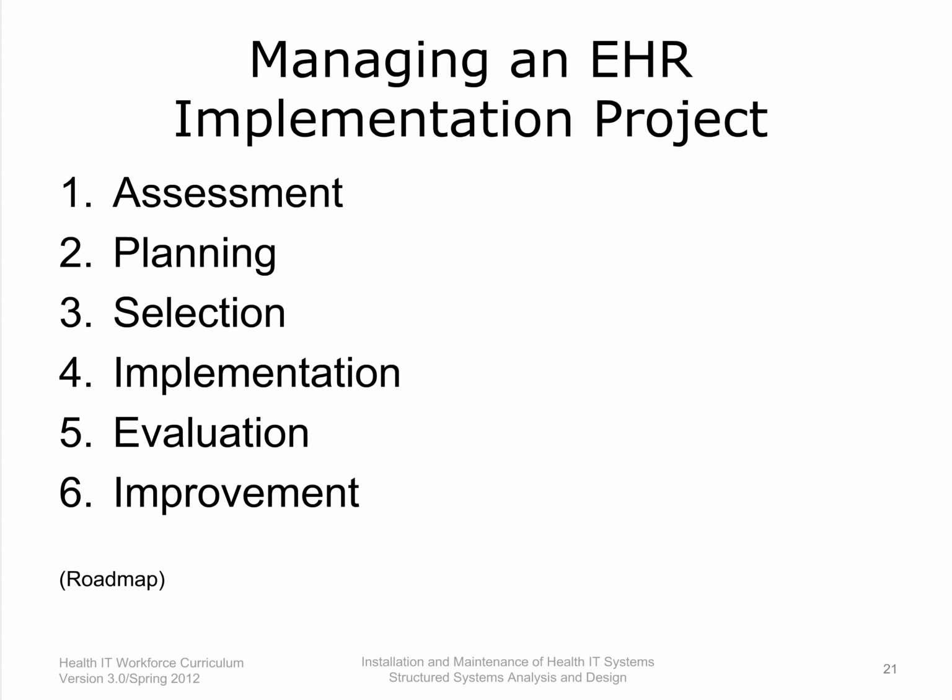A plan for migrating any old data over to the new system must also be devised, including any necessary database conversions in a manner that ensures data integrity. A staff training program is initiated and system testing follows. Then, the staff begin to use the EHR system. Throughout the process, a journal of experience and processes is maintained.